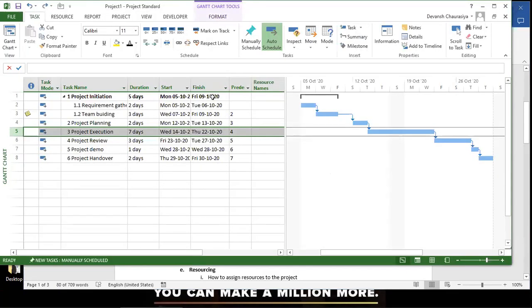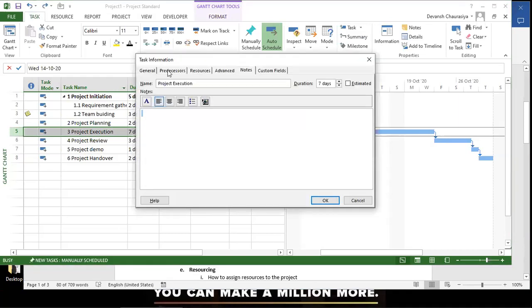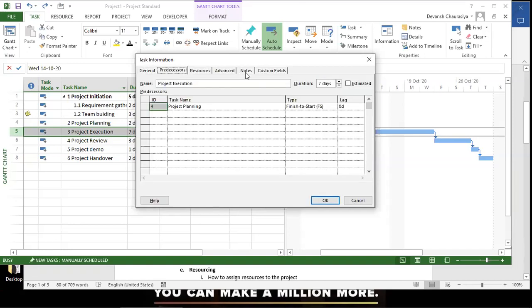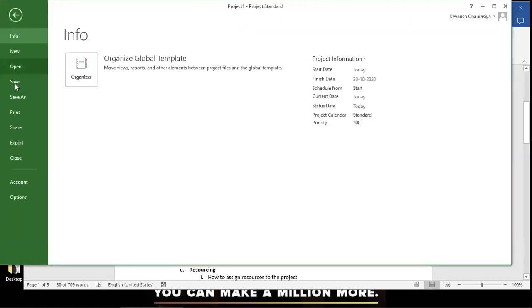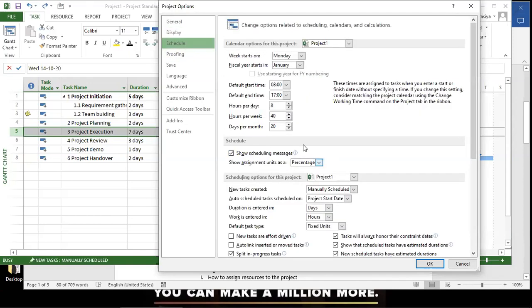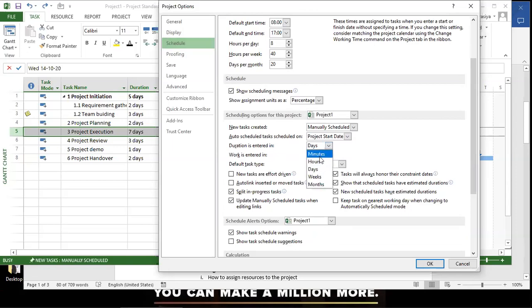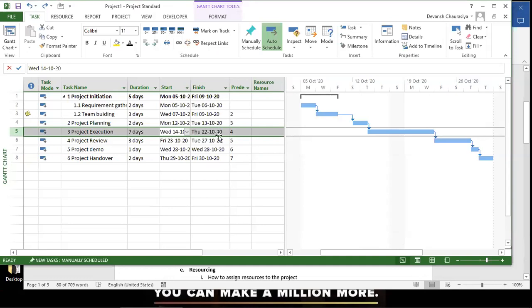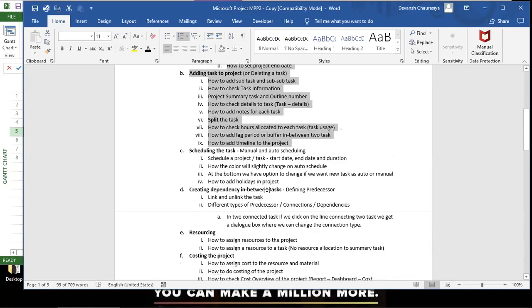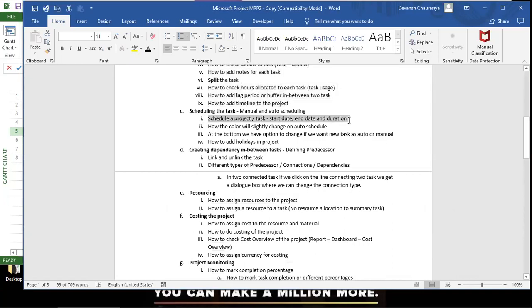When you double-click on a task, the duration shows as 7 days because we configured duration in days, not hours. The work time is 8am to 5pm — 8 hours per day. In Options under Schedule, duration is entered in days. To check lag or timeline, and scheduling from start/end date and duration — all of these have been covered.